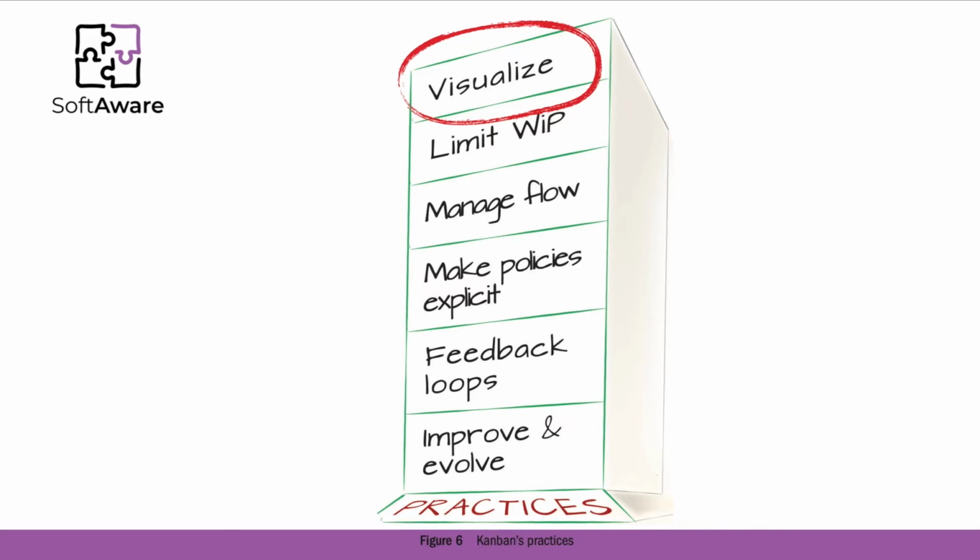Don't be mistaken, the goal is not to have a simple flow system, but to include commitment and delivery points that are well defined. Furthermore, it also displays the limits for the work in progress and explicitly presents the policies. Policies are a summary of what needs to be done before moving items between the distinct columns or stages of the board. While the board designs vary, the method is not constrained by the design, and it also has no direct implication on the actual card design, the card that describes the work.